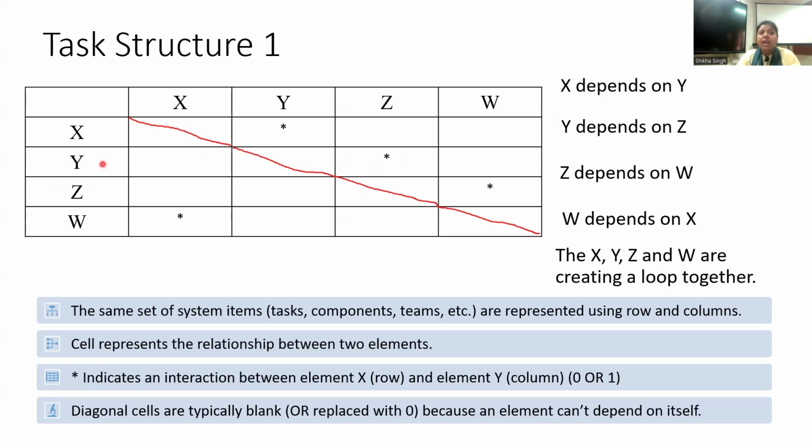And now if you finish y, then again you may be getting information when z will be processed. So a piece of information you will receive when z is completed. So then again our information input you will be receiving from z. Then what will happen? Rework of y. Now again reworking on y. Again some information change may be there, and x will again impact it. So that is how this cyclic loop will keep on happening.